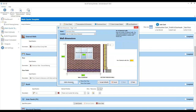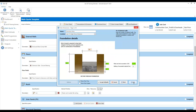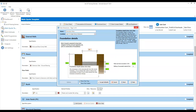The gable dimensions are automatically calculated by Estimator Express as well — that's the triangular areas of wall at each end of the lean-to. If we click next, the next screen deals with the foundation details. It's taken the foundation depth below site strip from the quote template screen — you'll remember we changed that from 900mm to 1200mm. We've got the foundation width here, which comes from the standard settings.